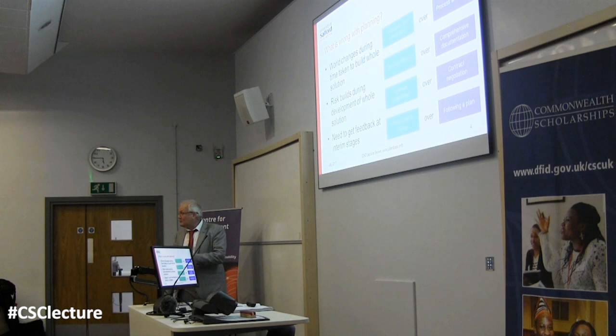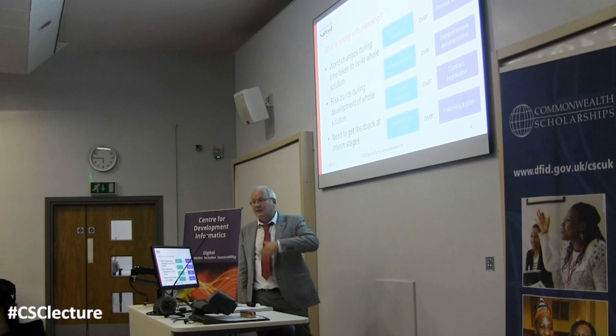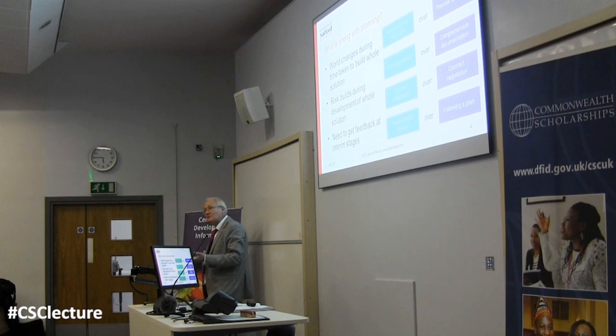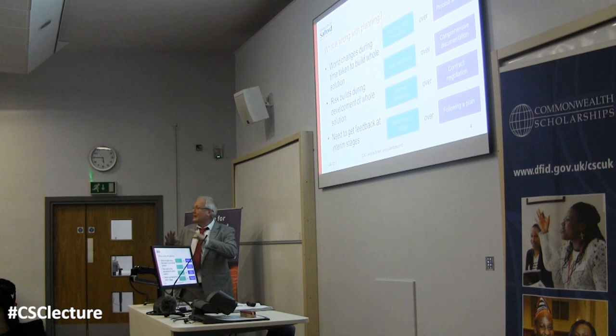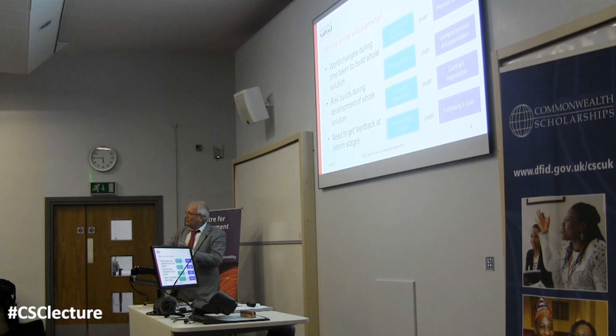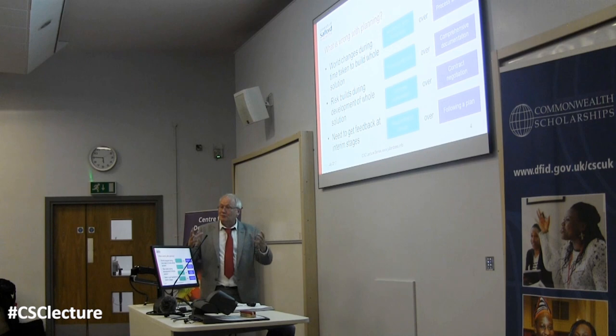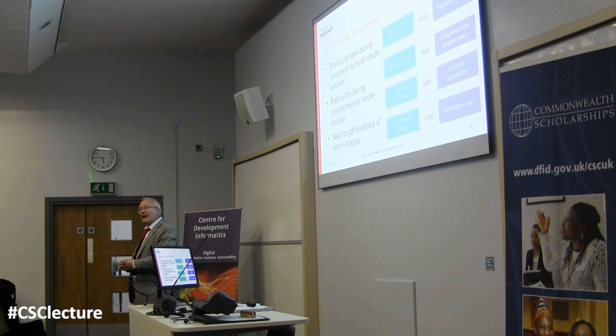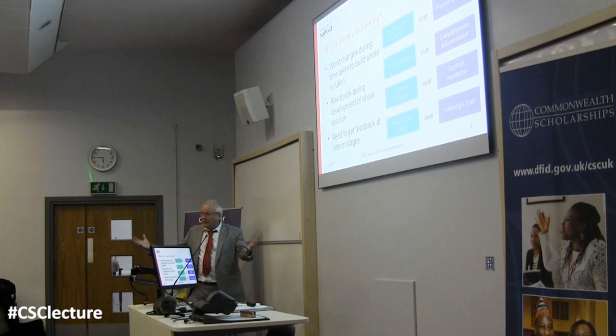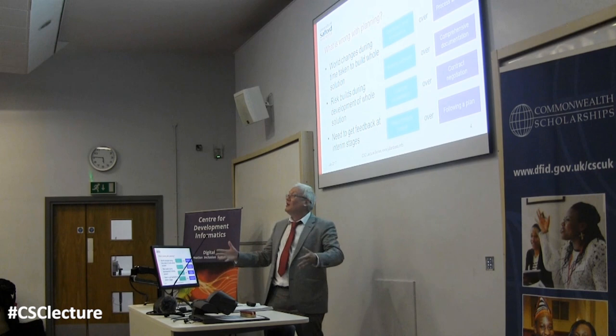The projects I'm talking about are often $30 million, taking 6-9 months to complete, with 50 plus developers, and that's not a particularly large project. But that's the kind of problem you have: as everybody's trying to get organized, things are changing. The other problem is that the further you get into this process, the more the difference between reality and what you're doing gets bigger and bigger. The risks to the project are getting bigger. The amount you've spent is day by day getting bigger. And until you do that final handover, the sums of money involved are quite large. If you've got a $30 million project, you're $25 million in and you're still not sure if you're going to have a good result.